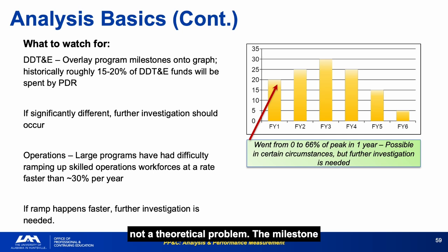The milestone overlay technique is simple but powerful. It requires the analyst to connect the financial plan to the technical plan, which is exactly the integration work that adds constructive value. A plan that cannot be connected to specific program milestones is a financial plan, not a project plan. That distinction matters for assessment credibility.